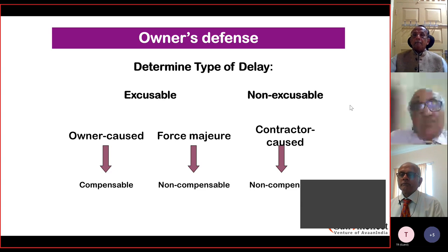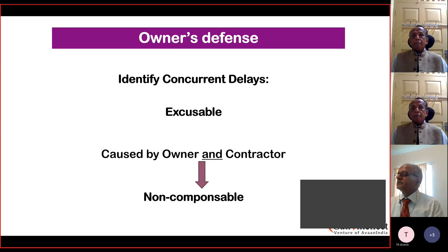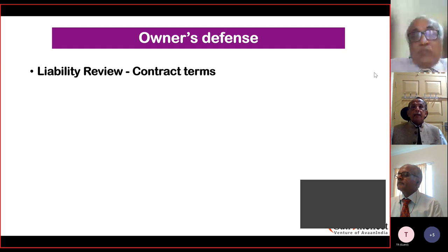Right, thank you. Let's move to the next one. Owner's defense. So if it is a concurrent delay caused by both the owner and the contractor, where there is a fault on both sides, then again, it is non-compensatable. Right, thank you. Owner's defense again.